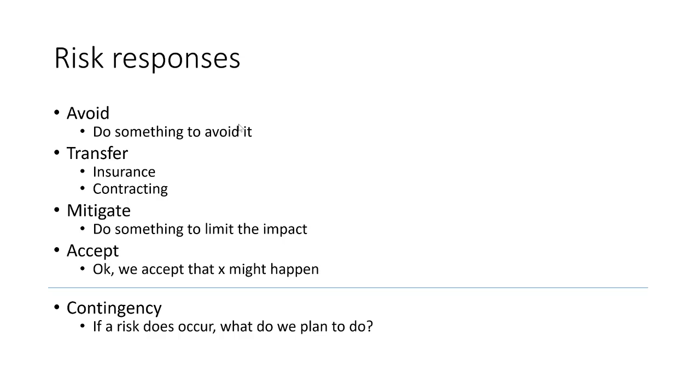You may transfer the risk. So to do that, you would maybe have your AAA card. So now I know that if I run out of gas, the AAA guy is going to come and save me. Of course, it usually takes them a long time to get to you, but you might be late for your concert. But that would be transferring the risk.